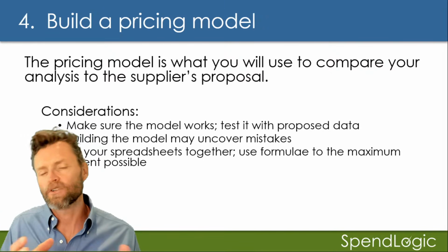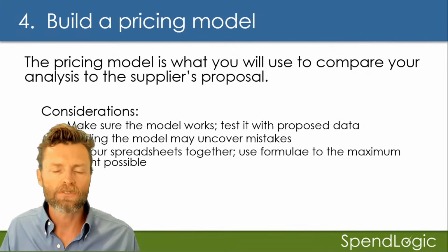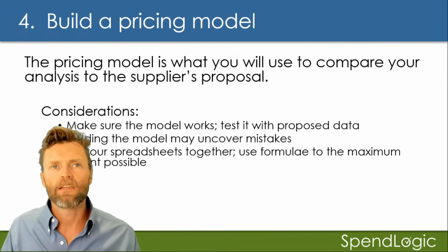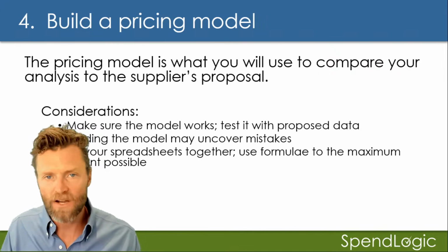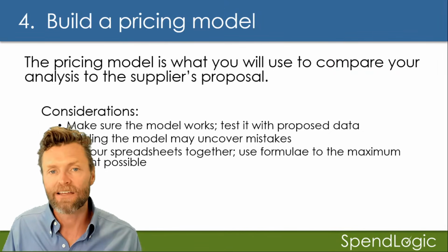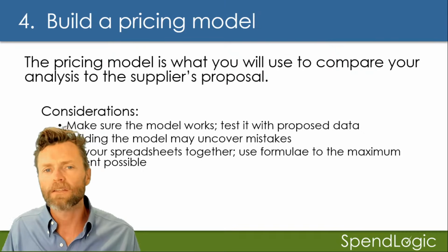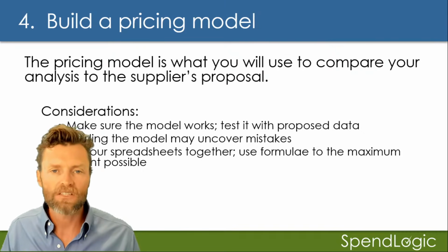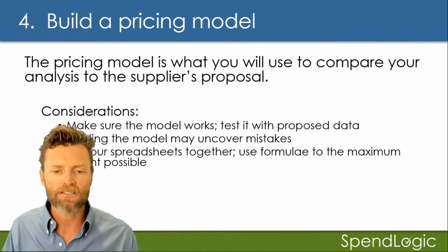What we always do is create an Excel-based pricing model that matches what the proposed prices are. And that does a couple of things. When you recreate their pricing model, a lot of times you're going to find mistakes. It's not hunting for mistakes, but it'll uncover things that were maybe not looked at or calculated incorrectly. These are things that you need to talk to the supplier about to make sure that you get an accurate representation of their costs.